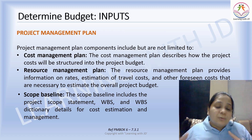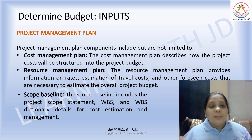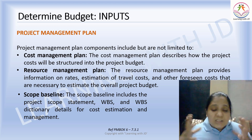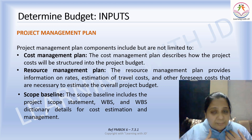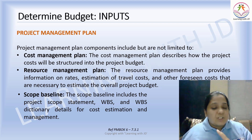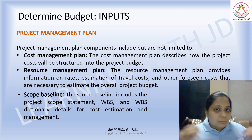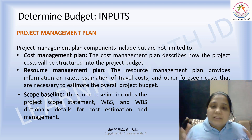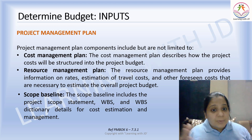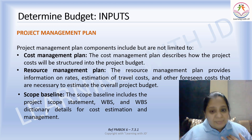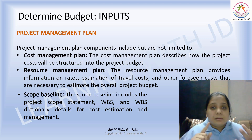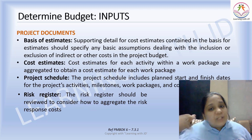Now let's look at the inputs for determining budget. You will need certain documents. From the project management plan, you need your cost management plan, your resource management plan — which covers people, warehouse, raw materials, machinery — and your scope baseline, which includes the project scope statement, the WBS, and the WBS dictionary.